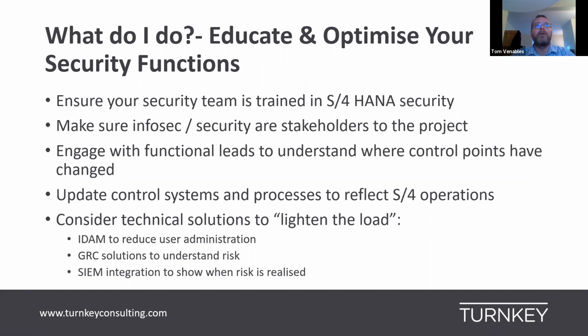So what do you do about it? Well, make sure your security team is getting trained, make sure they're stakeholders to the project, make sure that they have input to designs and understand the design decisions that are being taken. Engage with the functional leads to understand where the control points have changed, where they have to be implemented through access controls, or where there might be a mitigating control to an existing risk.